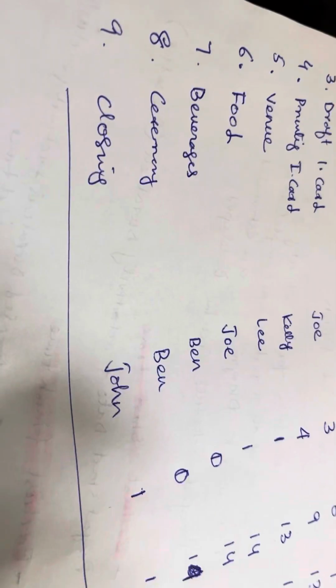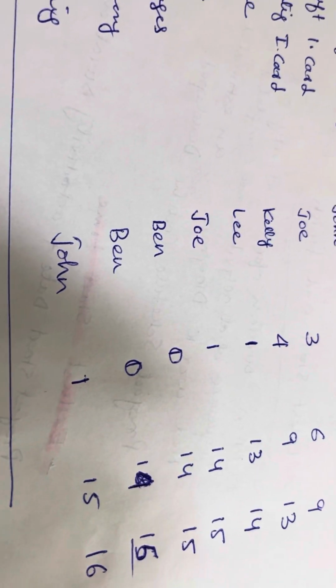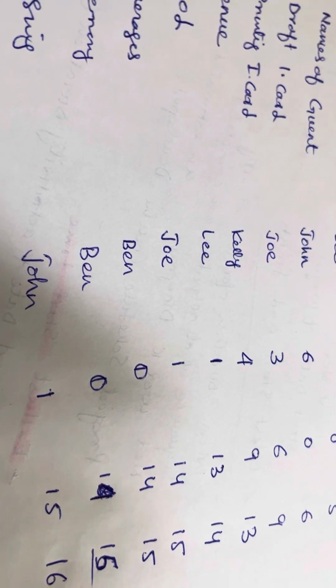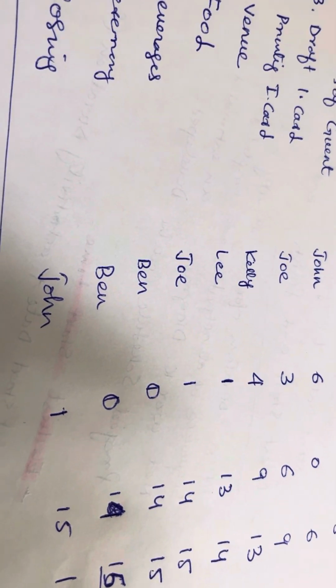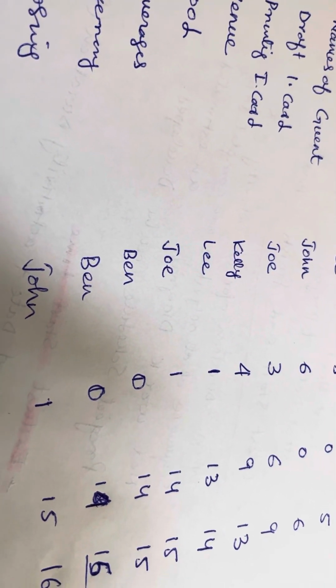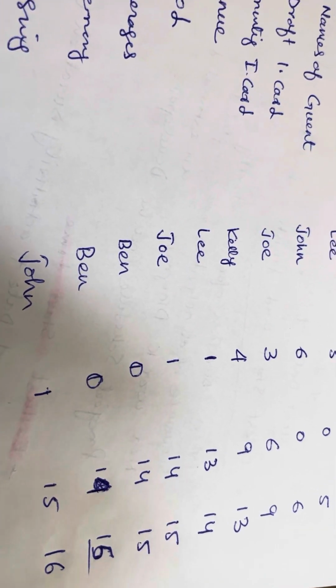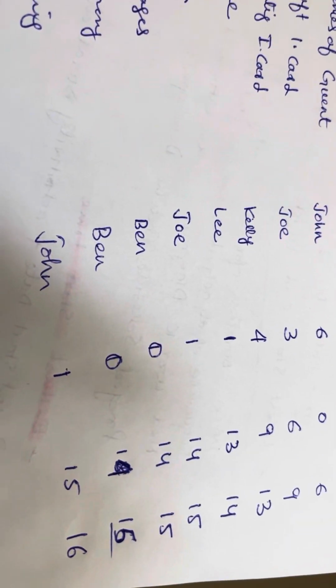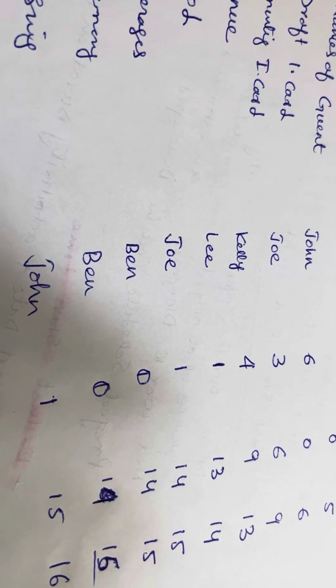And then the next is closing. So John will close all the activity, talk to the venue and payment and to the people and everyone. They pay and they calculate everything, they finish the payment, they clean. Well, maybe not the payment; we can talk about this later in budget. But John will close, and it will start when everything is finished on day 15. So earliest start for the closing will be 15, and it's 1 day, so 16. 16 is the earliest finish of the project.